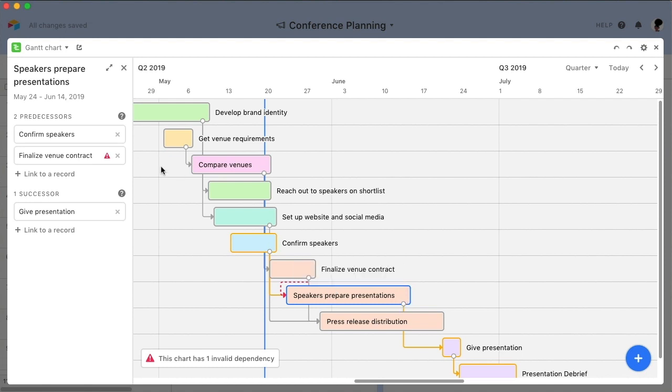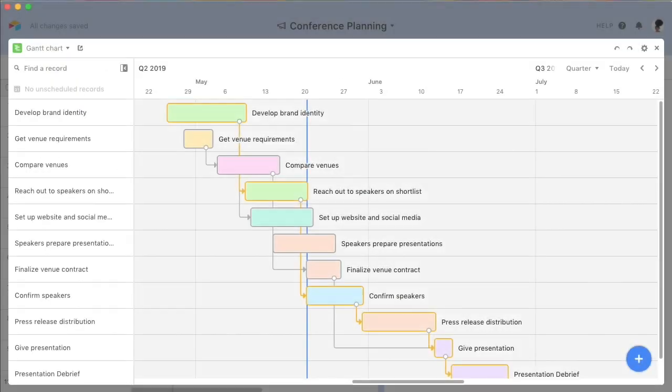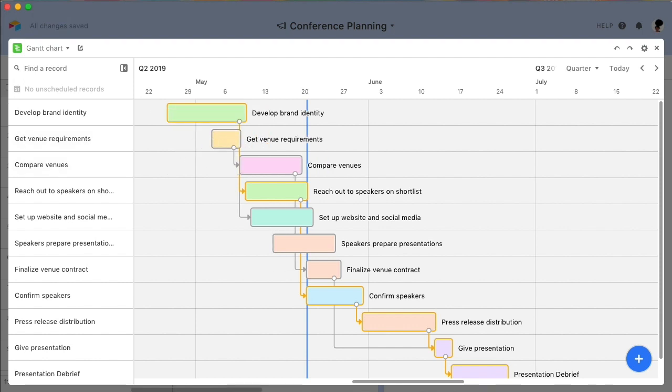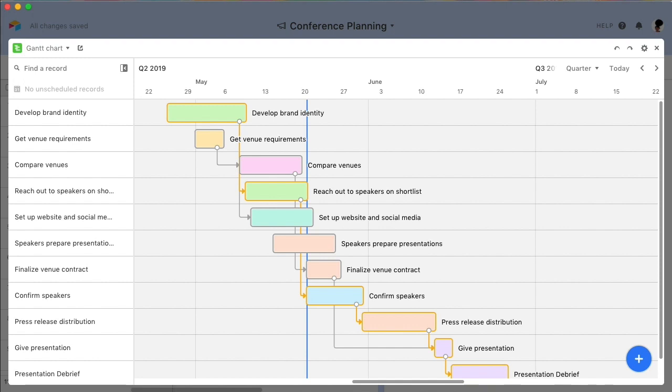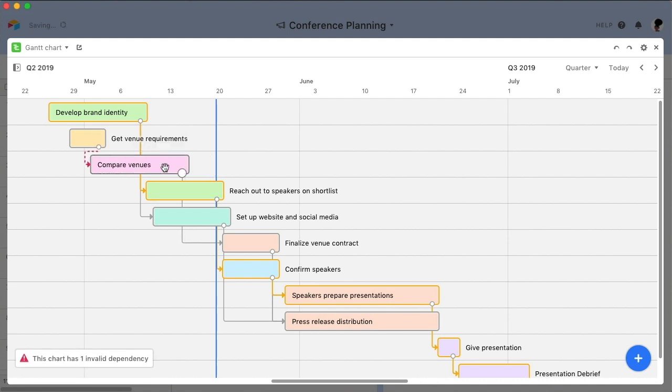When dealing with dependencies, keep in mind that adjusting the start and end dates of a record can affect other records that have been linked to it. For instance, if you change the end date of a predecessor to end later than the start date of any of its successors, the start dates of those successors will automatically shift back to accommodate this change. The same thing happens if the start date of a record occurs before its predecessor's end date. This way, regardless of how you move things around, Airtable will adjust the dates of all dependencies to preserve the order of operations that you have established. If you'd like to shift the dates of a task without creating this ripple effect, simply hold the command key while you click and drag.